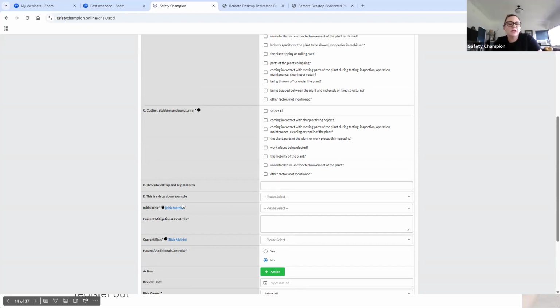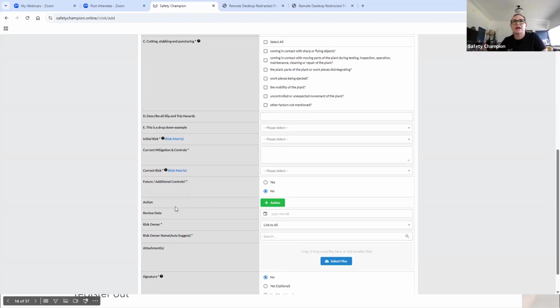Yep. All good. The only other couple of things I was going to add to that, you can refer to your risk matrix in the system. So there's a generic one in there, but if you have your own risk matrix, you can provide that to us and we can upload it. And the other good thing, when Megan was saying about transposing this from your spreadsheet onto here, we can really make those review dates stand alone. So you're not having to review a whole risk register all at once. You can set dates for particular items in your own particular timeframes that need to be reviewed.